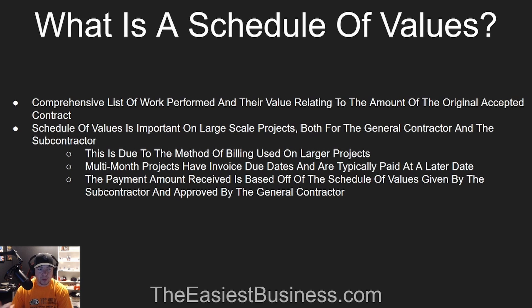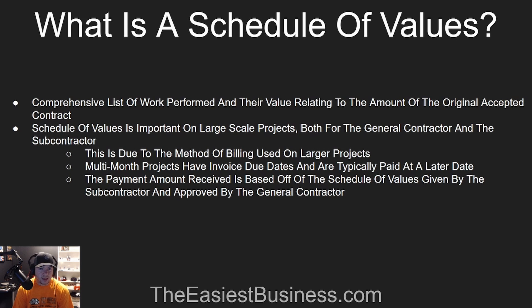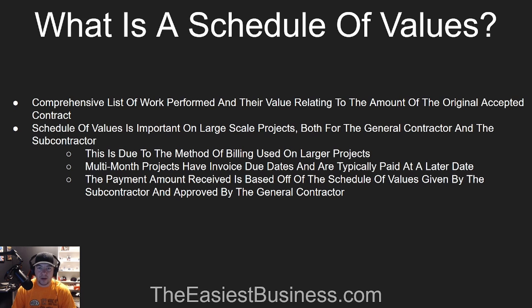It's based around billing and the percentage of work that's complete — mainly used on larger projects. Especially multi-month projects, you're usually not going to have to submit a schedule of values on something that's like a two-week project — that's just too short for them to worry about. Multi-month projects have invoice due dates that are typically paid at a later date, depending on your agreement with the contractor.